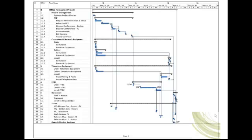The project manager for the office relocation project discovered the furniture manufacturer will be on a holiday shutdown on the projected order date of the furniture. The manufacturer will not ship any orders for the week after Christmas and will delay all orders by five days after they receive them. The project manager also discovered the opening date of the new office can be moved to Monday, February 7th. An examination of the schedule reveals the task relocation will not be completed until the 9th. Before the project manager tries to adjust the schedule to accommodate the deadlines, he or she will examine any resource constraints.